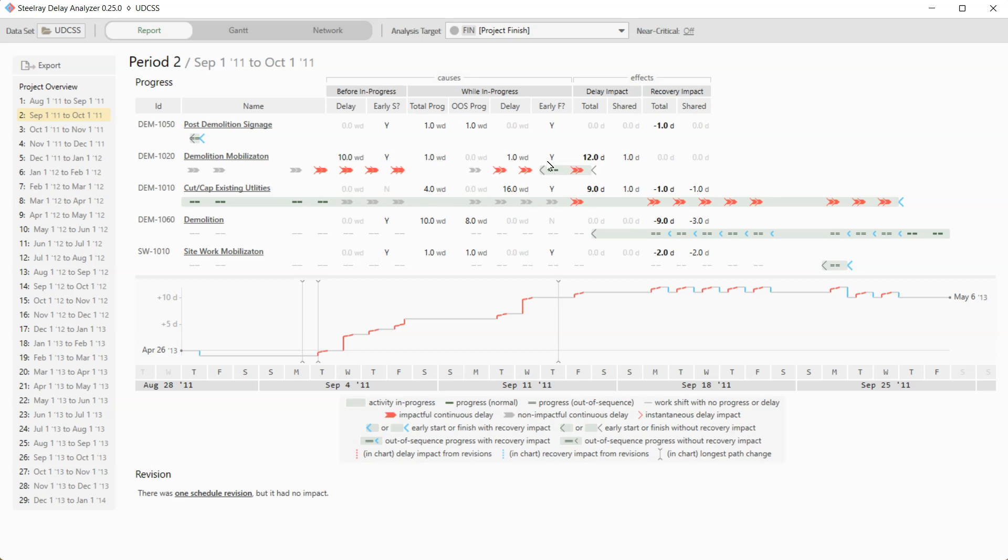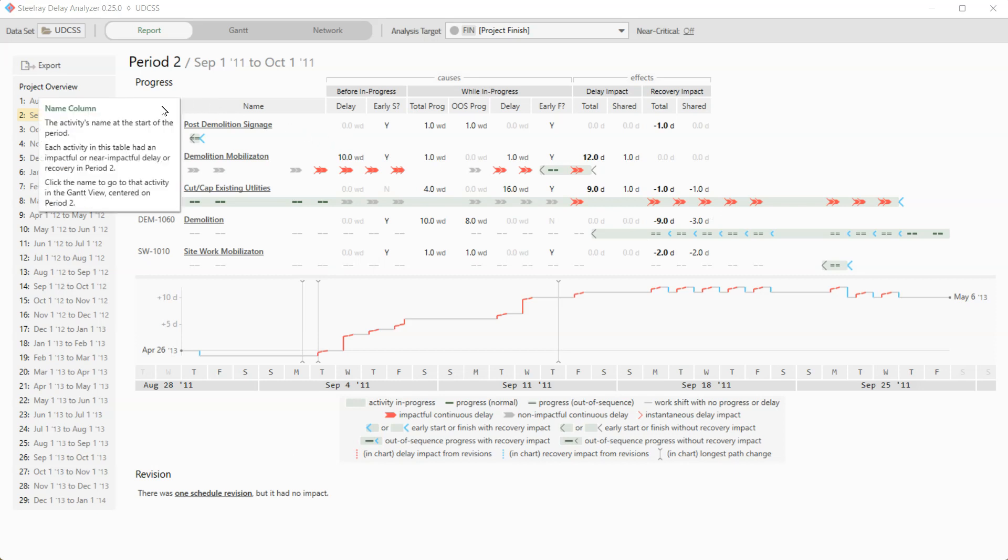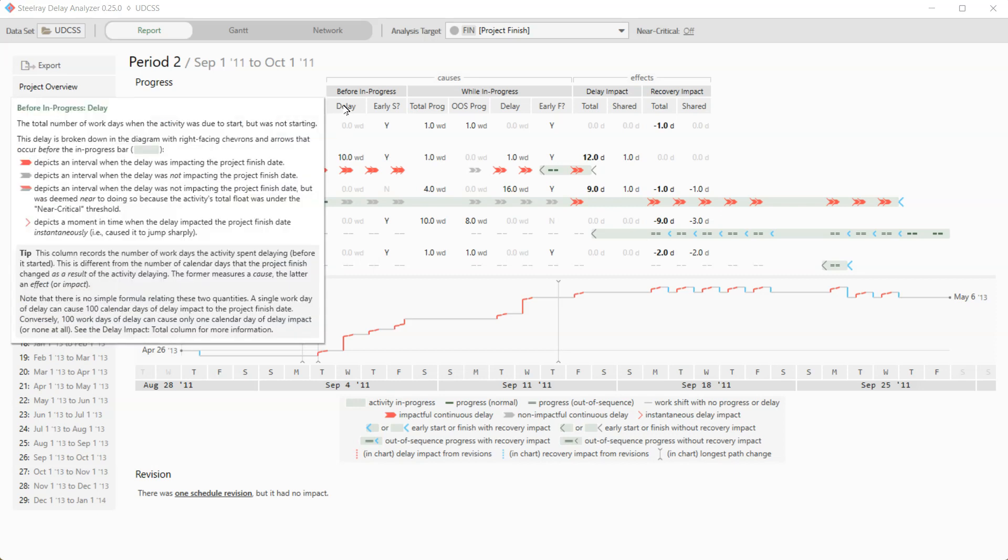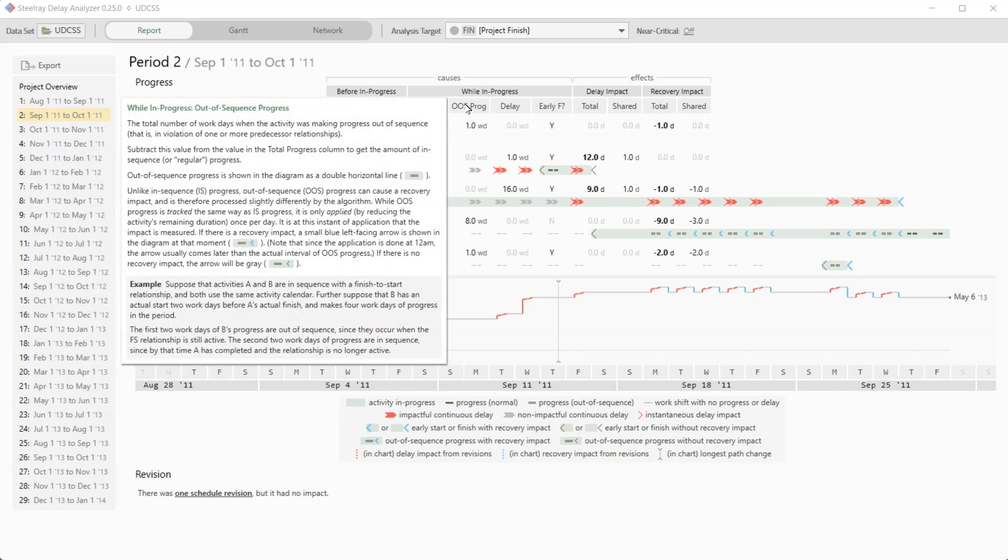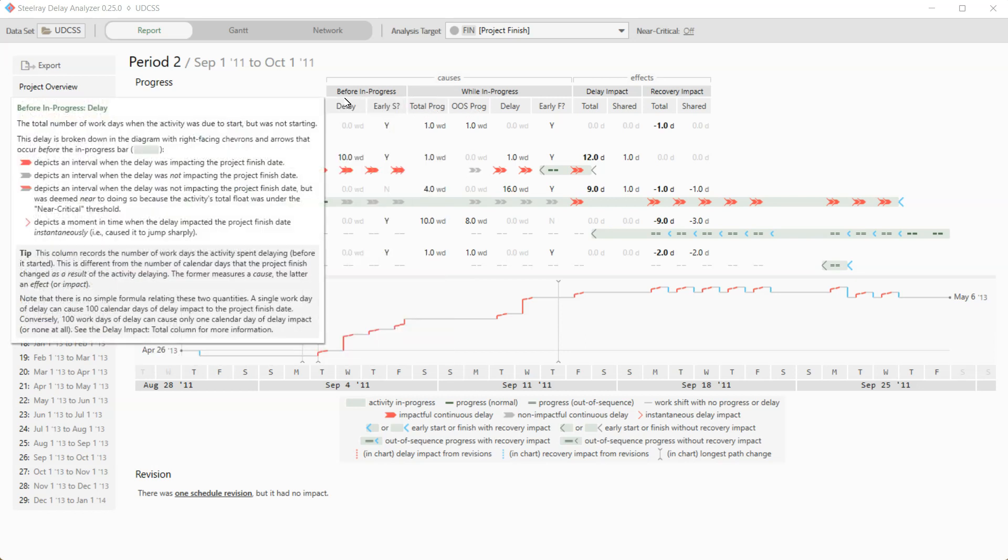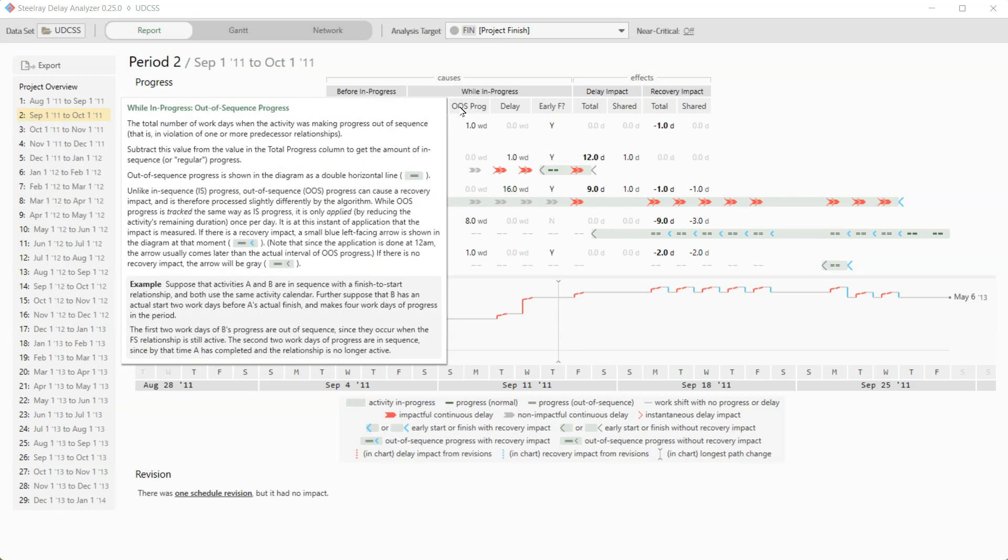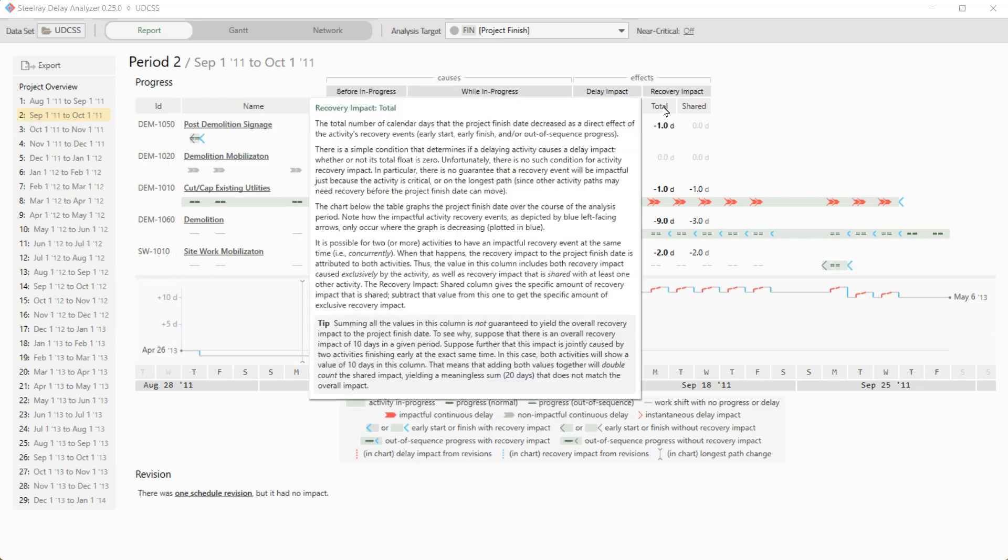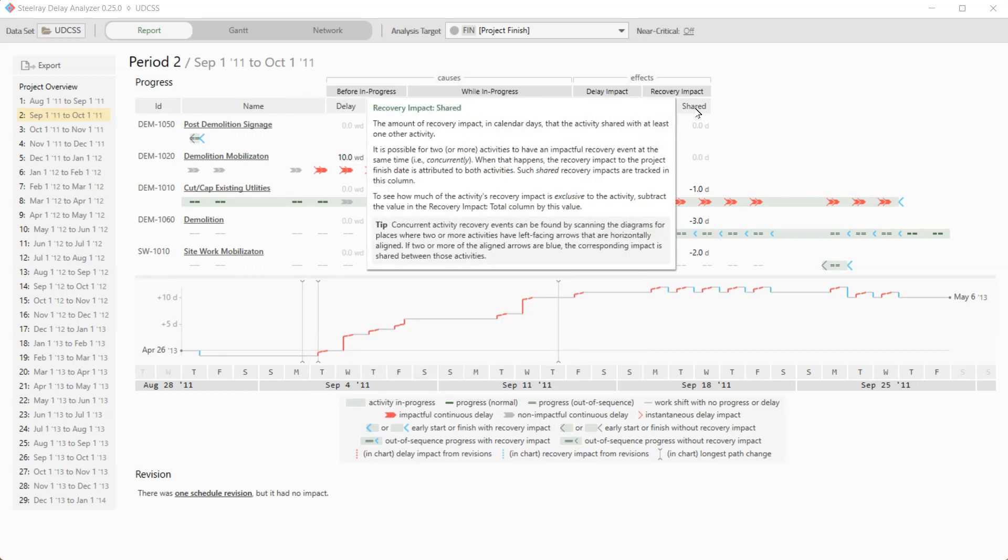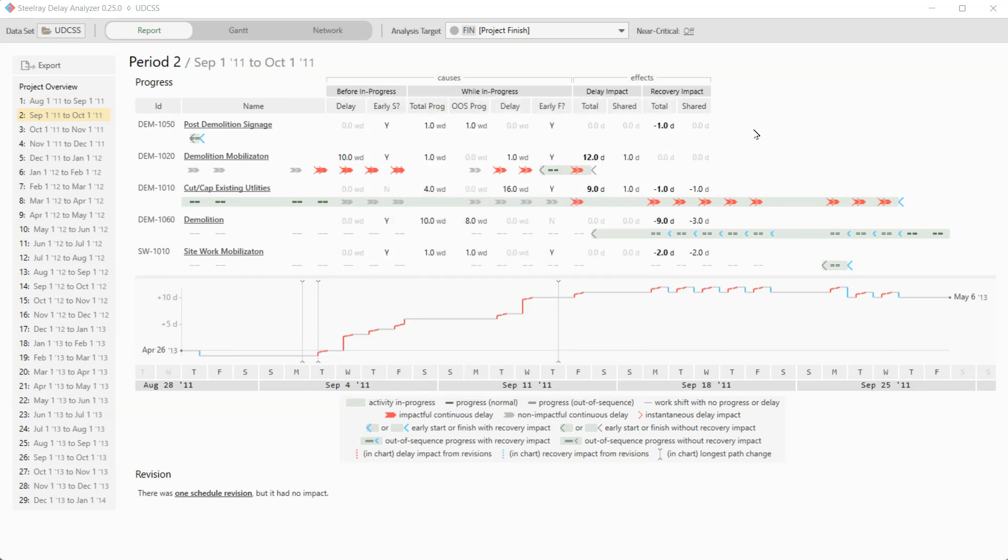And we can verify the early finish in this column right here. And so that's what these icons are telling you is as we did the delay analysis, we did do it not only day by day, hour by hour, but actually minute by minute. And we recorded what was happening and we're showing you those results in this view. Now, if you don't know what any column means, you can just hover over it and we give you help. And so OOS progress, for instance, OOS prog stands for out of sequence progress. You just hover over anything and any column header and we'll tell you what it is.